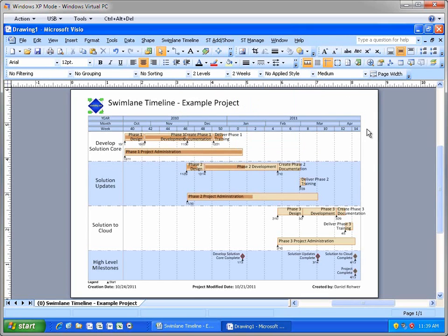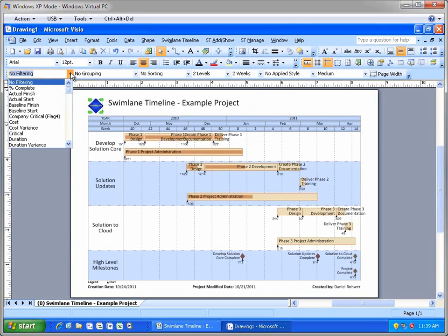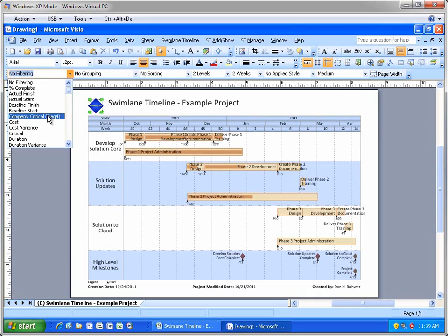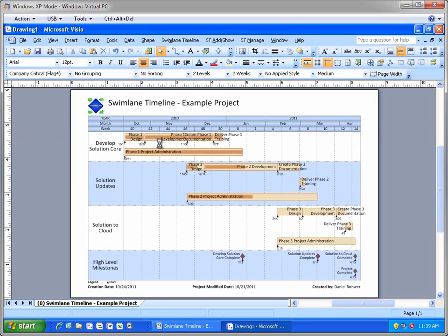If you remember, there was a custom task flag in the project that indicated which tasks were deemed company critical. So if my project contains 10,000 tasks and I only wanted to report on the status of 100 key tasks, then I can set the flag for just those tasks and the Swimlane Timeline allows you to filter on that task flag like this.